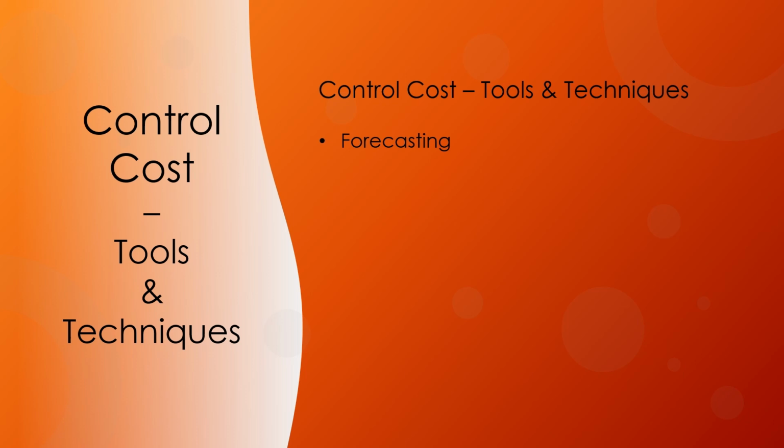The project manager's bottom-up EAC method builds upon the actual costs and experience incurred for the work completed and requires a new estimate to complete the remaining project work. It's calculated by using the equation EAC equals AC plus bottom-up estimate to complete.